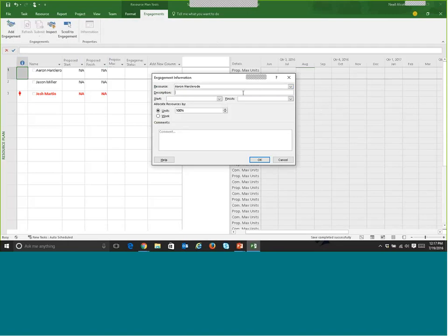So I can go into here, I could say, need Aaron to do some work, and I'm going to need him to start on, say, August 22nd. I think he's going to finish the end of September. And I need him 100% of his time. If you think you need him for less than that, you can just go in and change the percent. You can also put in hours. So if you switch to work, you can say how many hours do you need over that time frame.